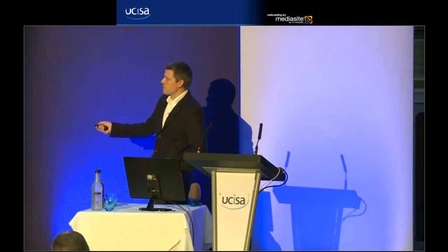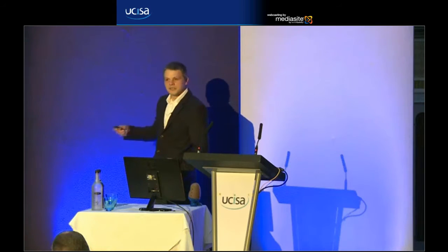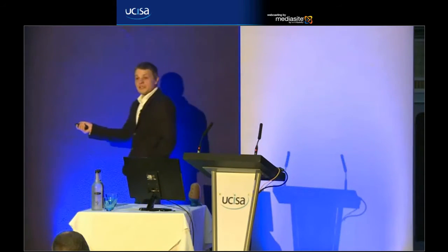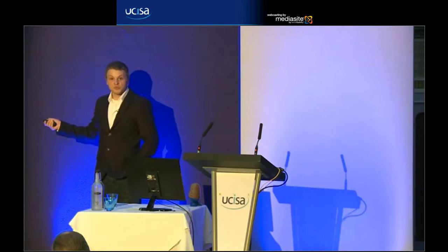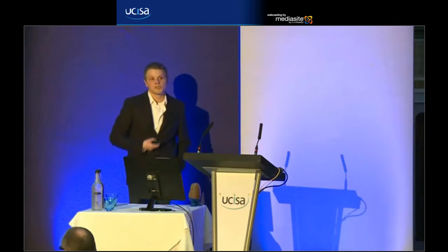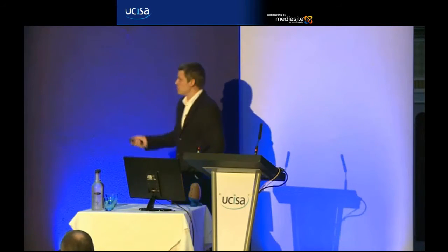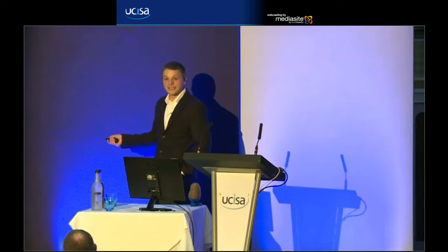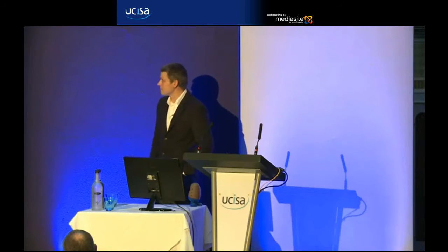If I get to a point like this where we've got a bit of a flat line, maybe I get a little bit worried, and go and ask everybody, is everything okay? Usually that's fine, because what it probably means is they're just working on a task, they haven't got to the end of it, and when they do close it, you're going to get a drop-off like this. But it's a tool to alert me to any possible issues, because obviously what we're wanting to achieve is, at the end of the iteration, to get down to 0 task points left.